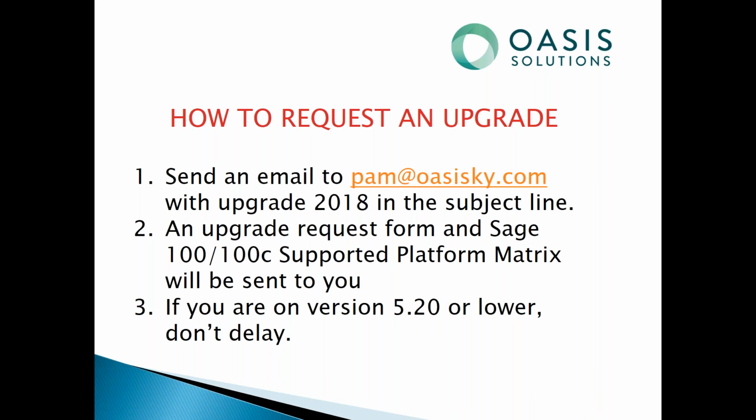What we had this past year is we had an influx in October and November that were wanting to upgrade prior to the end of the year, and it's just impossible to fit that many upgrades into a short amount of time. The other thing you need to keep in mind is if you have custom modifications or third-party products, that also enhances the lead time for an upgrade.